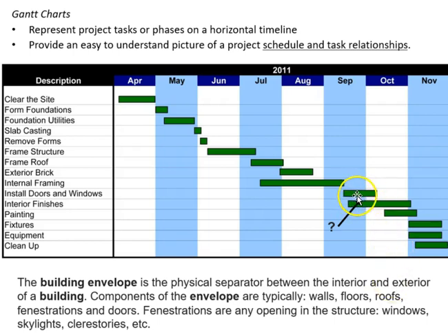And what I was looking at right here was questioning, are they really beginning to work on interior finishes before they finish that building envelope? Without the doors and the windows in, the building envelope's not complete. So I was wondering if these two things could actually happen at the same time. Otherwise, I thought it was pretty reasonable, and that's one thing that's always of interest, is when more than one different crew is working at the same time.